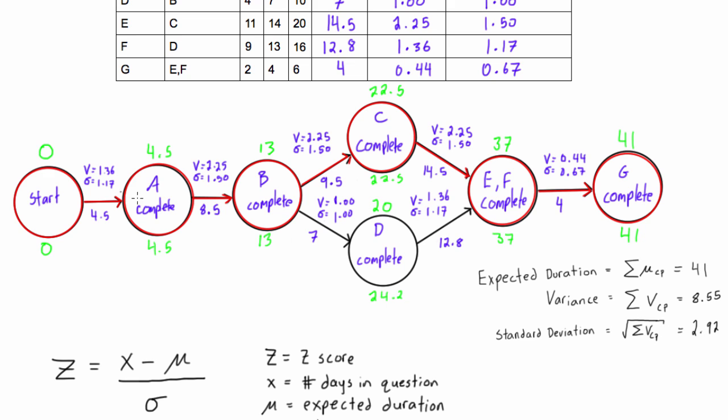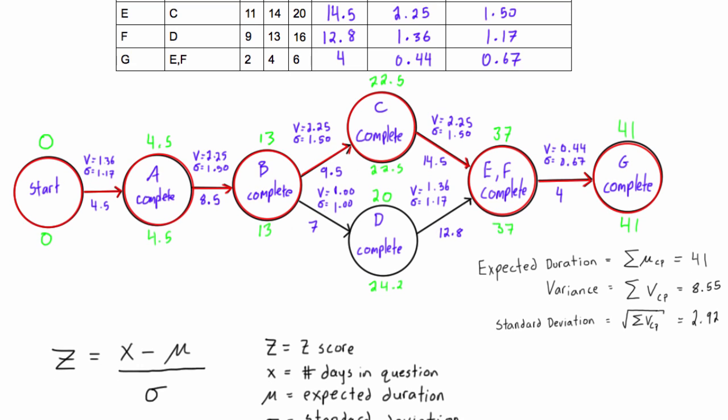We found expected duration by summing up the expected durations along the critical path. We found the variance by summing up the variances along the critical path. And because of the central limit theorem, we can't sum up the standard deviations along the critical path. So we just take the square root of the project variance and that gives us the standard deviation.